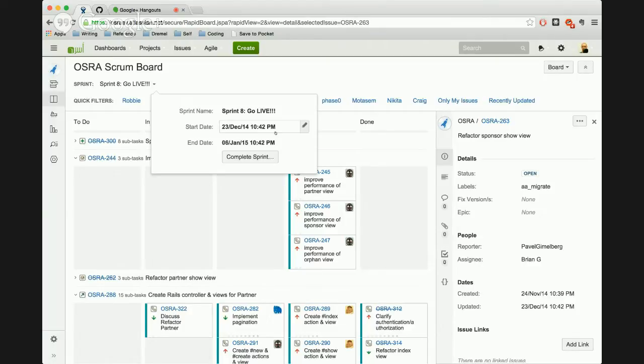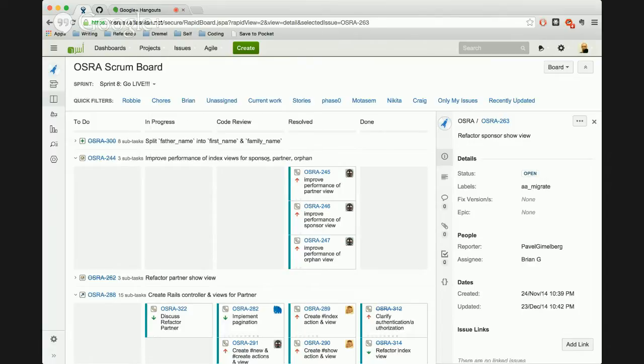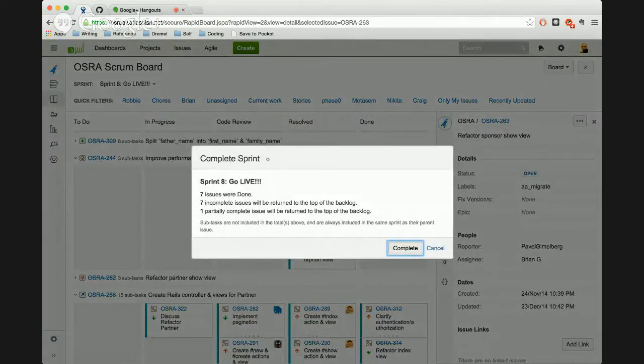The end date is half an hour from now, but we can probably go ahead and call that done. 7 issues were done. We have 7 incomplete issues that will be returned to the top of the backlog, and 1 partially complete issue will be returned to the top of the backlog. Okay.